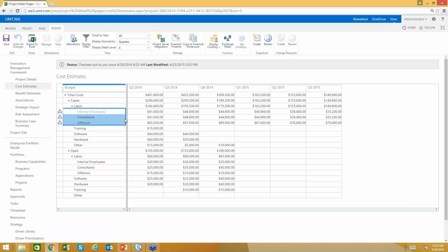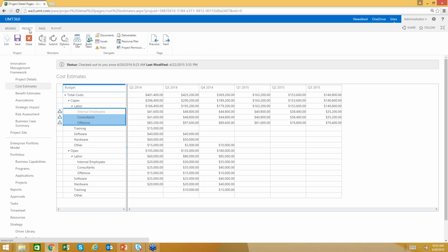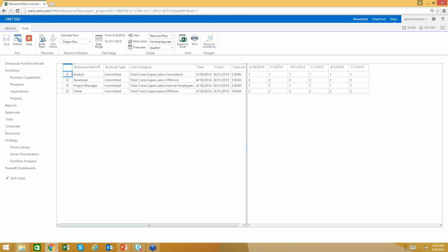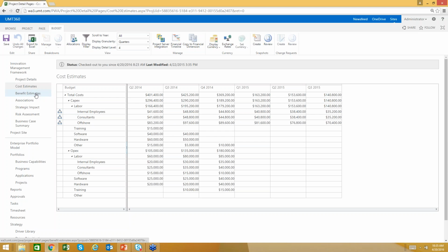But we notice this grid is actually automatically aggregating resource assignment costs. In this case, these resource assignment costs are being managed at this stage in the project's life through the resource plan. So we can capture resource requirements, in this case the high-level roles needed to fulfill this potential project, within the resource plan, or have that captured within the schedule, which can feed the financial views here. These are the types of skills or roles we require, and this is potentially when they're needed. So far, within this business case, we have high-level project metadata, cost information, and high-level resource requirements.